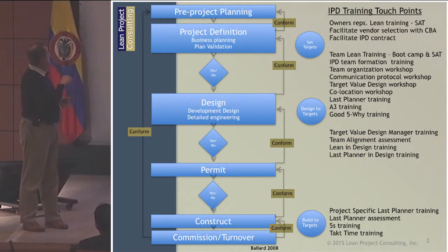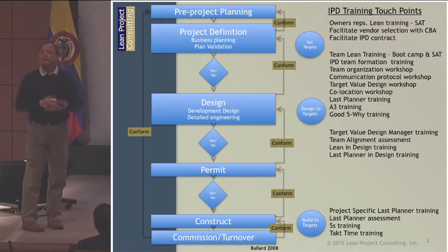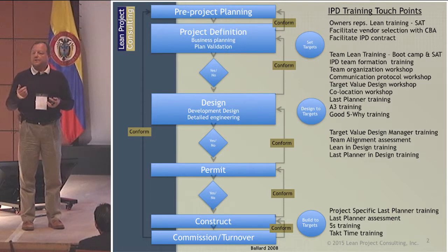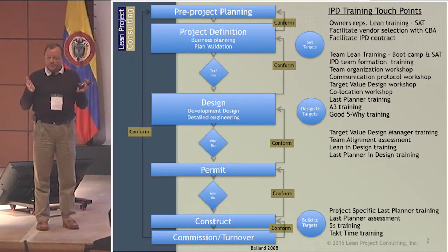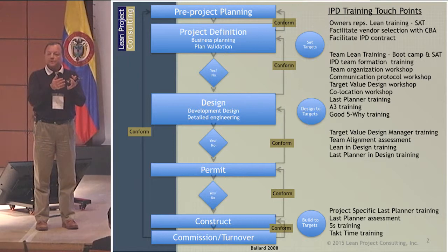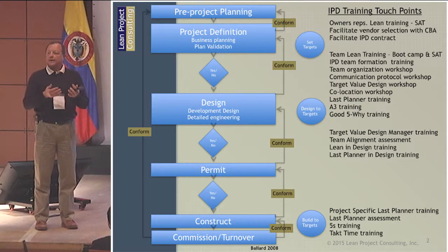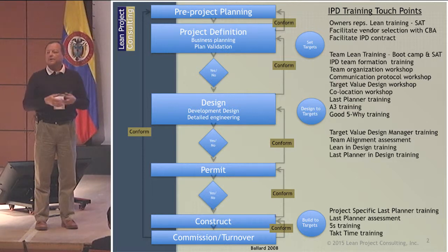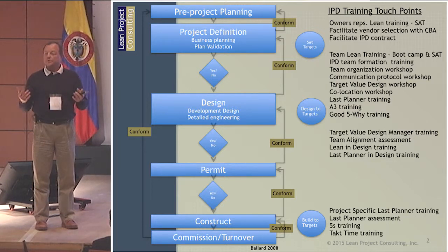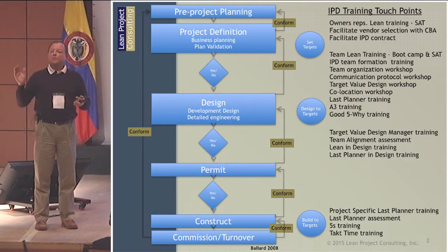Traditionally, this pre-project planning is done in isolation. An organization surrounds a small group, decides they want a building, a business planning department usually gets involved, and they have a conversation with the CEO, the CFO, a few managers, and then perhaps the board. They decide that if we build this thing, it makes good business sense. And what do they do? They immediately go hire an architect.